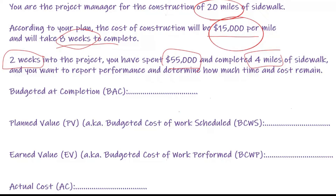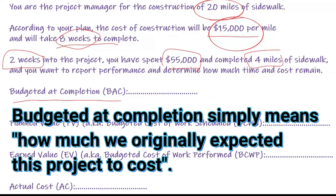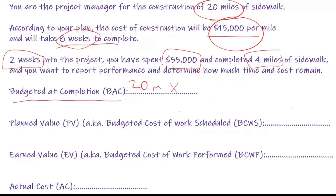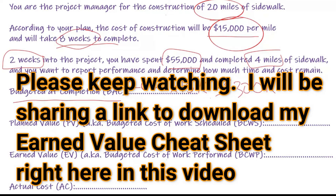The first thing we need to do is figure out how much this project should have cost, and that's called the budgeted at completion (BAC). The budgeted at completion is how much this project is budgeted for by the time it's completed — the total budget. So since this was 20 miles times $15,000 per mile, that gives you $300,000 as a total budget.